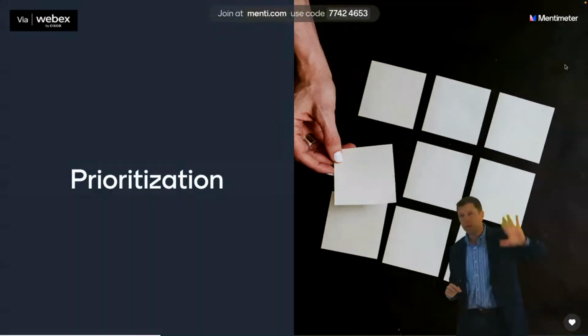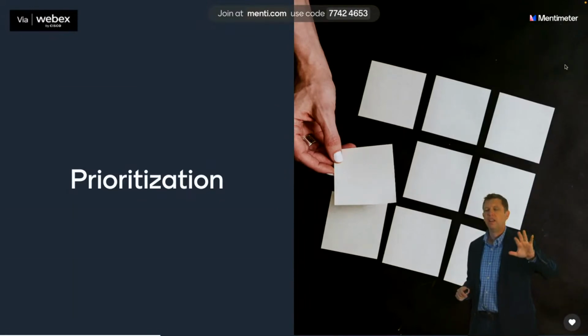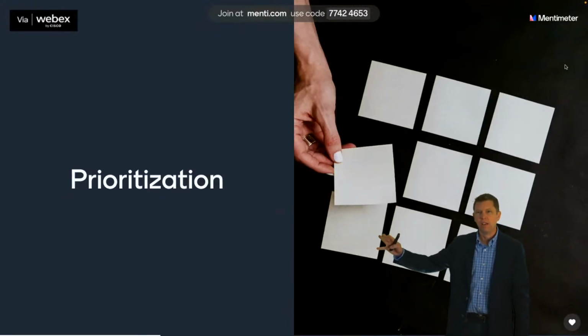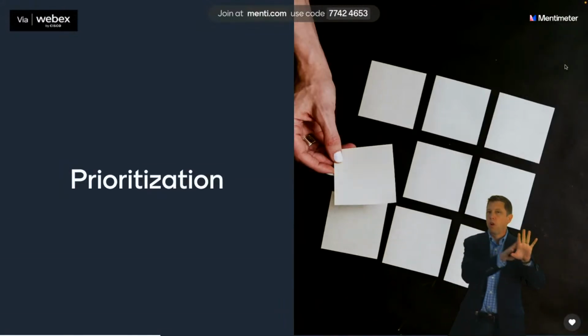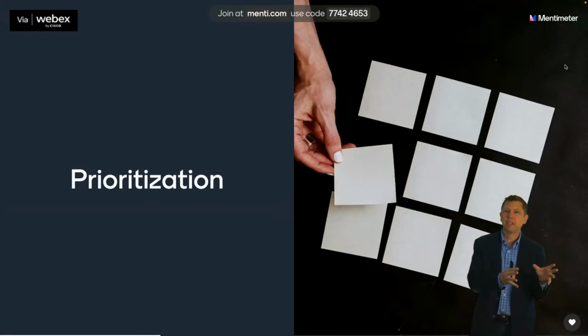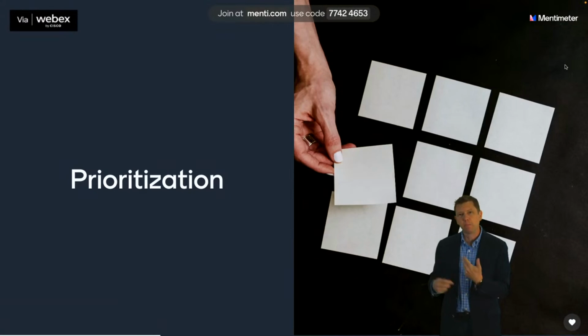And he said, okay, we're going to have one bucket here that is MVP. Nothing goes in here unless we have to have it in order to process a bill. Then we've got another bucket here that is non-MVP. And people were really struggling because they really wanted their things to be classified as MVP. So he created another bucket and said, these are the fast follows. So once we're able to process a bill and this is running live, these are the next things we're going to work on. And that kind of broke the logjam.